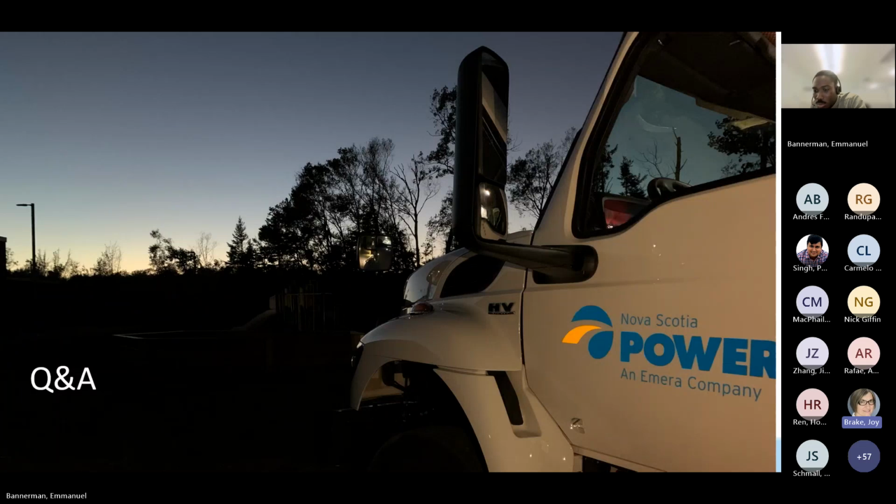If they wait till the last minute and come in with, oh, we changed our turbine, sorry, we're going to say, so sad, too bad. It's going to be 6 months before we can even get you into process. Let's get set up, we run it, we test it, we go back and forth. It would definitely not be in the best interest of a project to have that kind of delay, because I can guarantee you in Nova Scotia, you will have a delay. We will not be able to turn it around that fast.